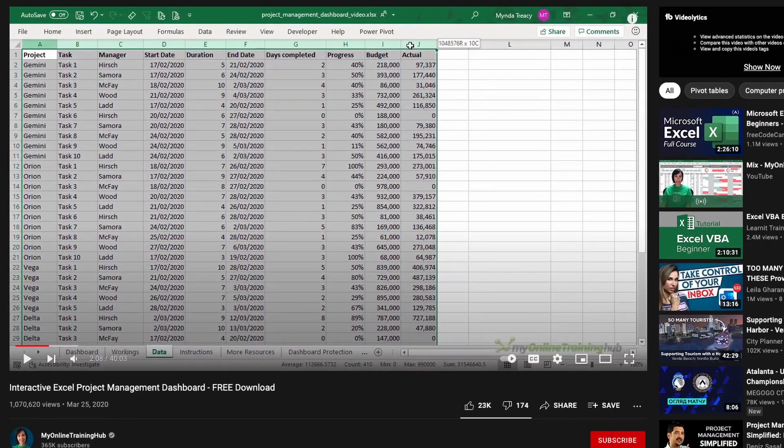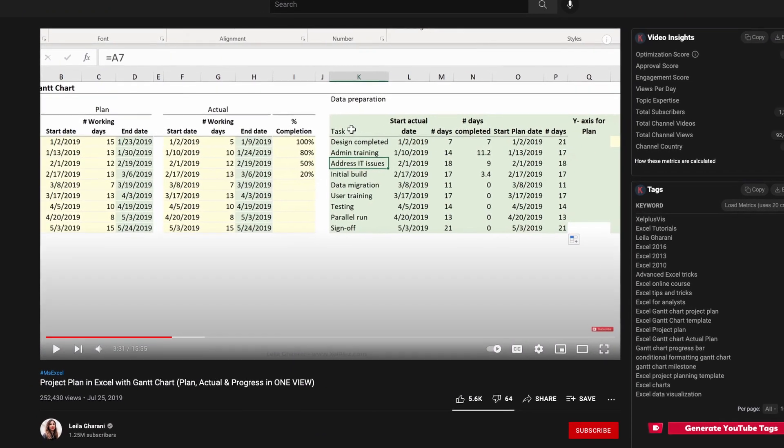In practice, even a small project with 10 to 15 team members generates about 100 tasks per month. If you look at all these Excel tools, you will see that at the backend they have a spreadsheet with raw data — all the tasks with attributes like planned values, actual values, duration, deviation, budgets, and so on. It will take a tremendous amount of time to maintain this list if you have hundreds of tasks, even over a few months. But the real nightmare comes when a change request arrives and you need to make a change somewhere in the middle of your project, because this change will not propagate across all the rules of your project plan in Excel.